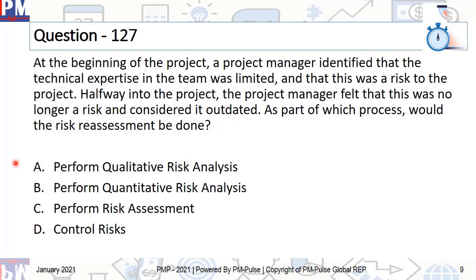The correct answer is D — control risk. Monitor risk or control risk is the process where you actually become smarter. You figure out those risks which you did not identify and then they occurred. So you have to make sure that you update your risk register or reprioritize it. You also come to know about those risks which are no longer relevant as the project progresses, and so you put them as in effect — they have passed their due.